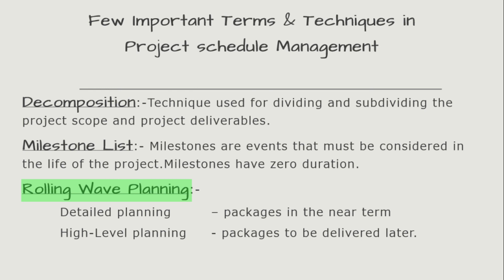Rolling wave planning mirrors this construct by assuming that things in the near future should be relatively clear, while project activities in the distant future may not be as detailed or as easily understood. Armed with that perspective, a project manager may choose to carefully decompose certain work packages with anticipated execution in the near term in great detail, while delaying analysis on work packages that will not be accomplished until later in the project. This type of planning must be revisited throughout the project, much as waves continuously roll into the shore.